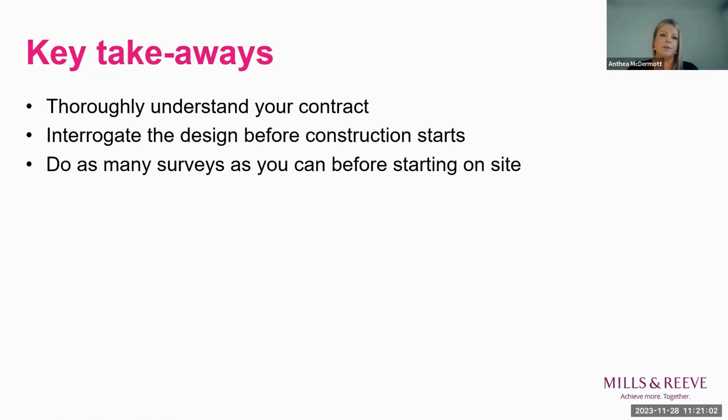Yeah, and broadly speaking, they do echo what Adrian has just said, but I would reiterate, always take time to thoroughly understand the contract you're entering into, and also take time to interrogate the design before construction starts and endeavour to do as many surveys as you can before starting on site, because that will just minimise the risk of raising variations, but also potential claims.